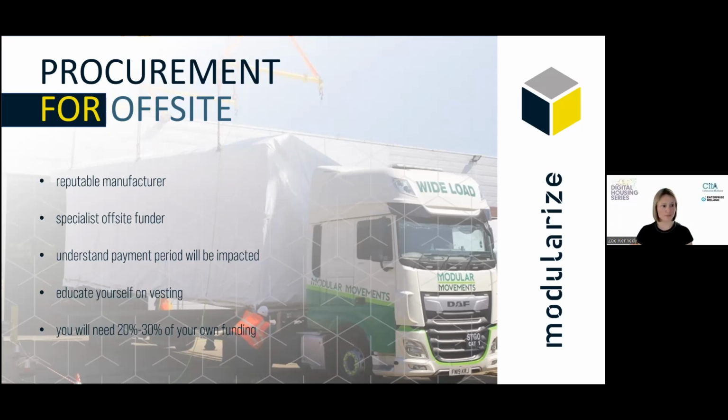An offsite manufacturer often requires an upfront deposit, somewhere between 10 to 30%, and then some form of bond from the manufacturers is needed for the creditors. So the longer the track record of a manufacturer, the less risk you have, really. The residential sector in particular is emerging, so many of the manufacturers are new, and that's a bit of a challenge.